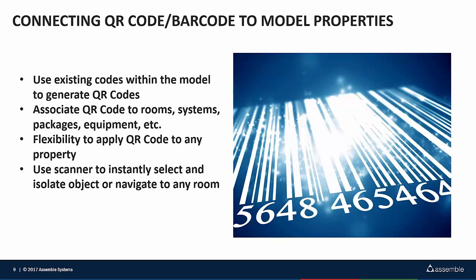With associating barcodes or QR codes, there are a couple of different ways you can do this. You can take an inventory of codes out of the model — there are QR code generators out there where you can create stickers and labels directly from that list of codes. That information could come from your source IDs, instance IDs, system names, system information, or your room names. It makes it really easy to create a list of properties, export that out, load it into a QR code generator, and ultimately print those out.